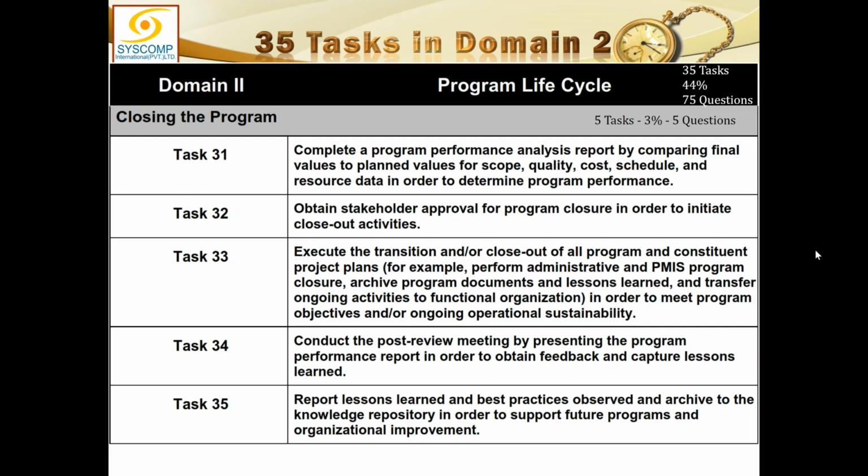And we sometimes did talk a little about how it is going to be transitioned, but that was not the focus of the project, how it transitions. But here, all the projects within the program are the responsibility of the program, because the program manager is taking on the responsibility not only of the benefit realization but also of transitioning these benefits to the operations. So not only the project benefits, but the whole unified program benefits are to be transitioned ultimately to the operation. And this transitioning could be a continuous activity.